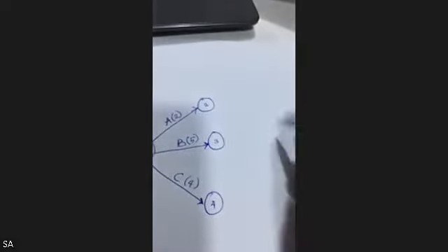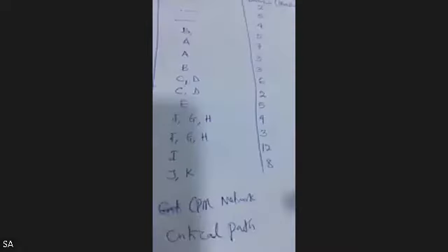We have C here. This is A, this is B, this is C. But you have B, and D is to start where B ends. But you have C and D here. So take a look at it. Somebody may want to say, maybe it is D, let me take my D this way. No, you can't take your D this way. Let me use this just to make an illustration. You know, this is your B, which is 5. This is node 3. Your D cannot be this way. You know why? Because the immediate activity that precedes D is B, and C must happen before D. So if I have to sketch my arrow, my arrow won't go this way.